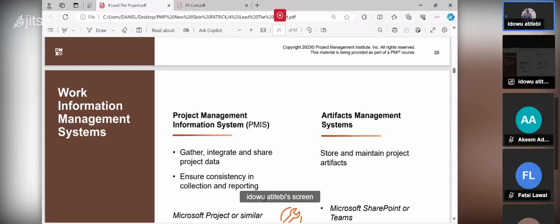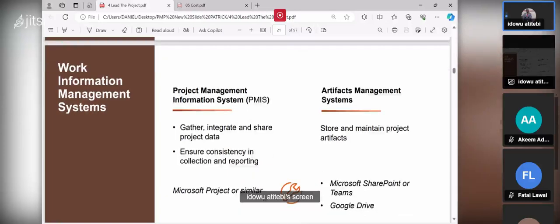If I want to use data A, I must not make the mistake of using data C. So there must be a marker to say, okay, this data is used for these activities. There must be what they call version control. If the data is no longer reliable, you can say this one is version 1, another is version 2, the information is version 3. Version 1 and version 2, we have already moved out of the way. Version 3 is the present one now.